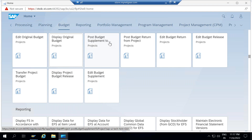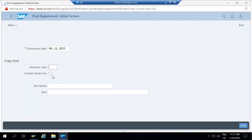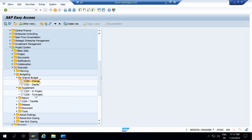If you click on Post Budget Supplement, it will show you the document date on which you are posting this, and the year in which you are supplementing the budget. If you want to supplement this budget in overall value also, you need to select that option and enter the text explaining why you are supplementing this budget. This transaction is basically CJ36.